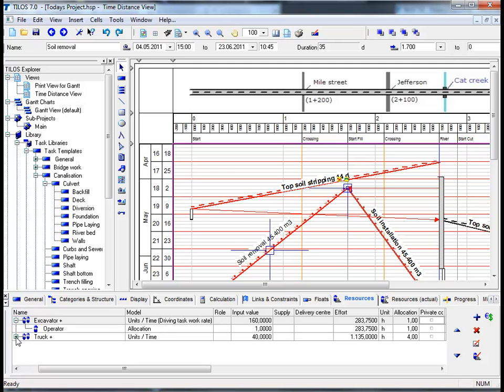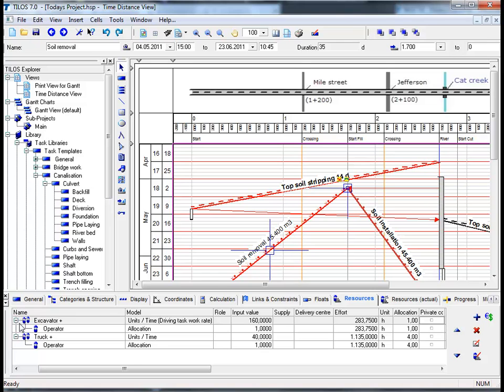If we go into a little bit more detail by clicking on the excavator and then clicking on the truck, we can see that with the excavator it is a complex resource—the excavator and the operator are both assigned per hour to this task. The truck is calculated by unit and time. This means how many units can the truck carry away, also per hour.